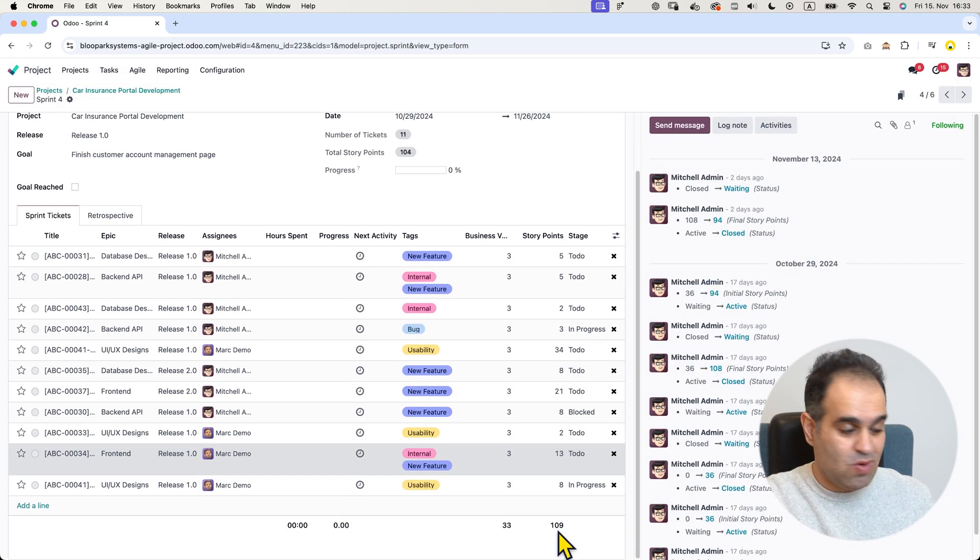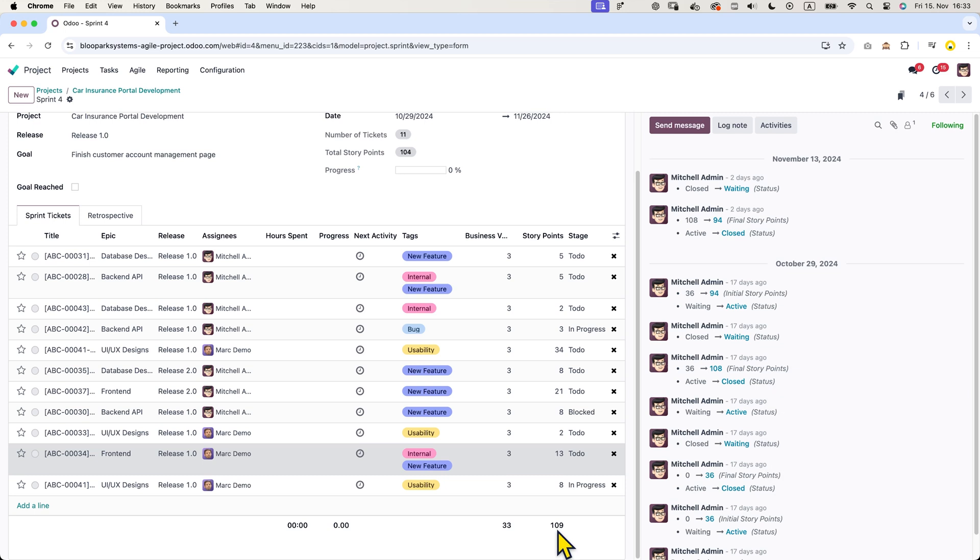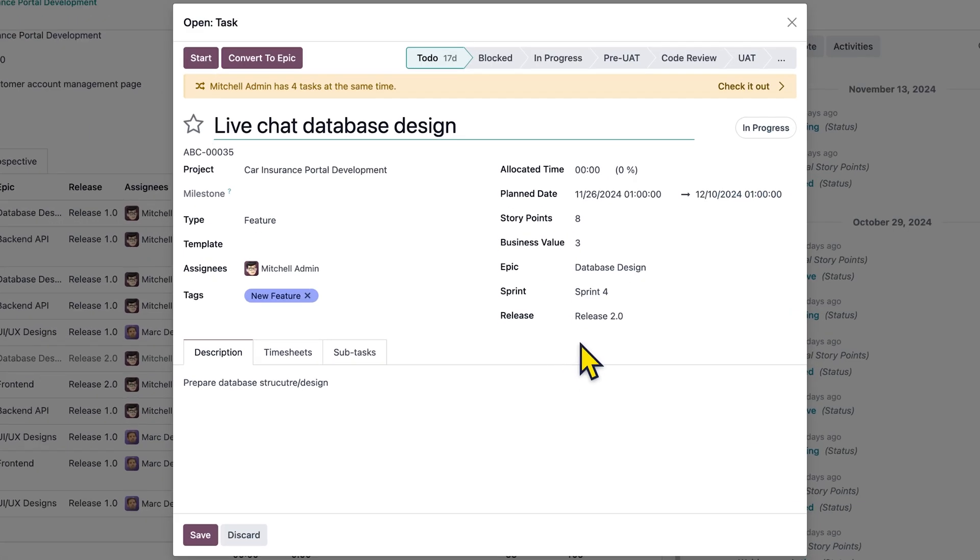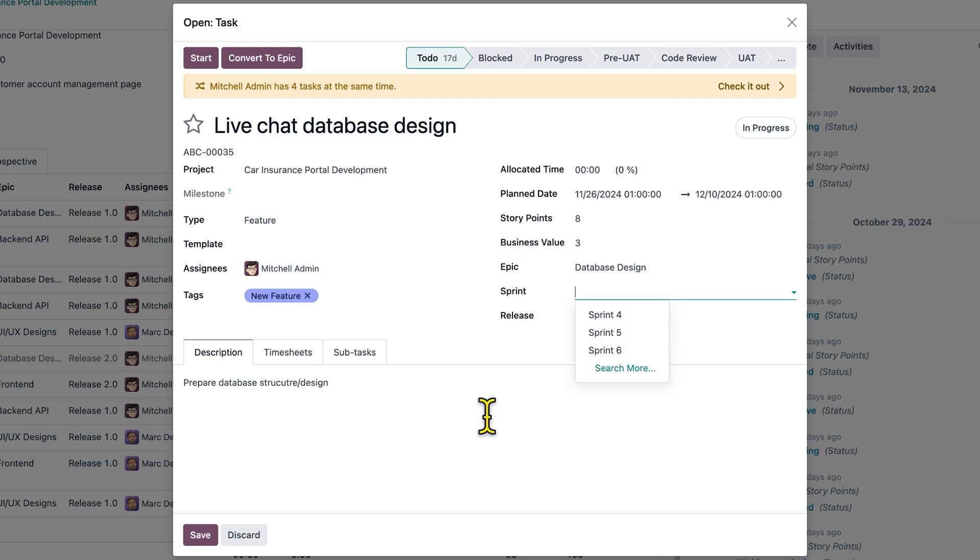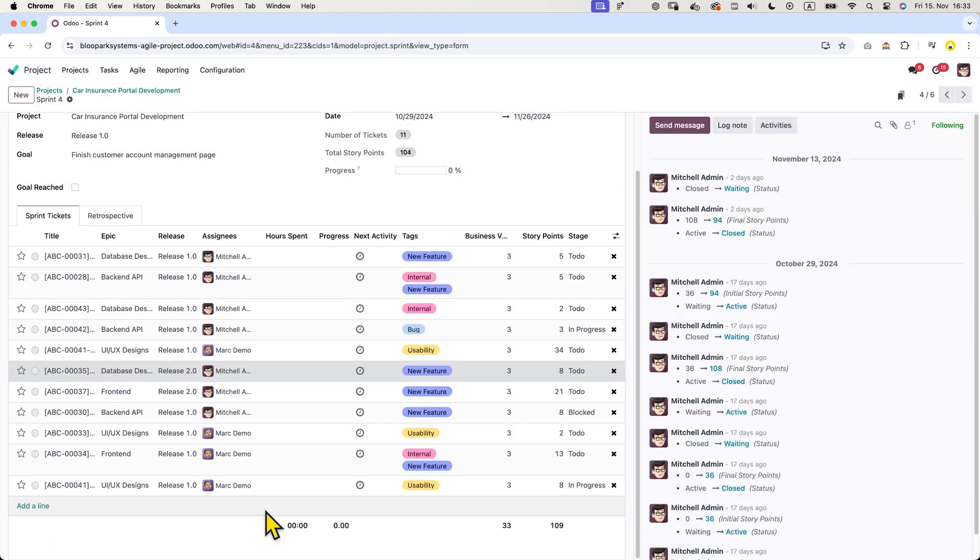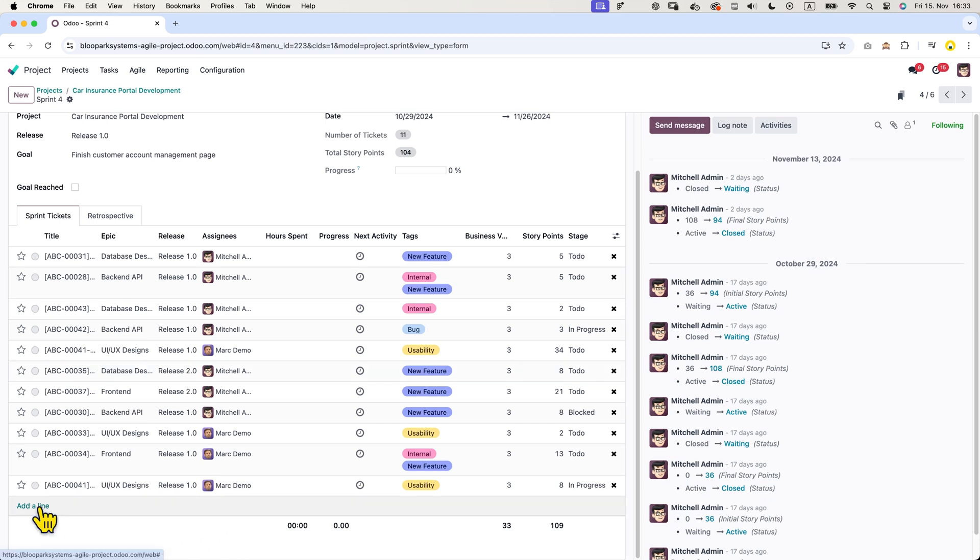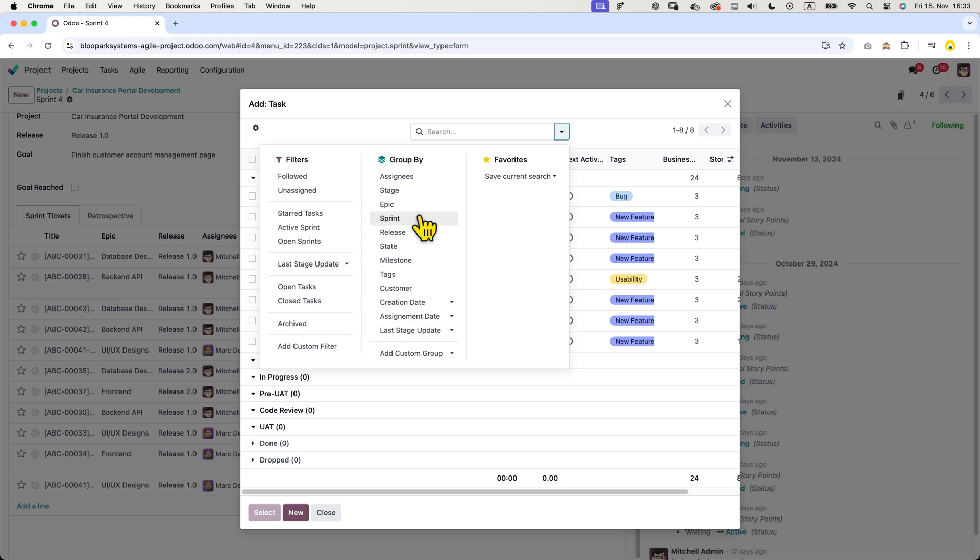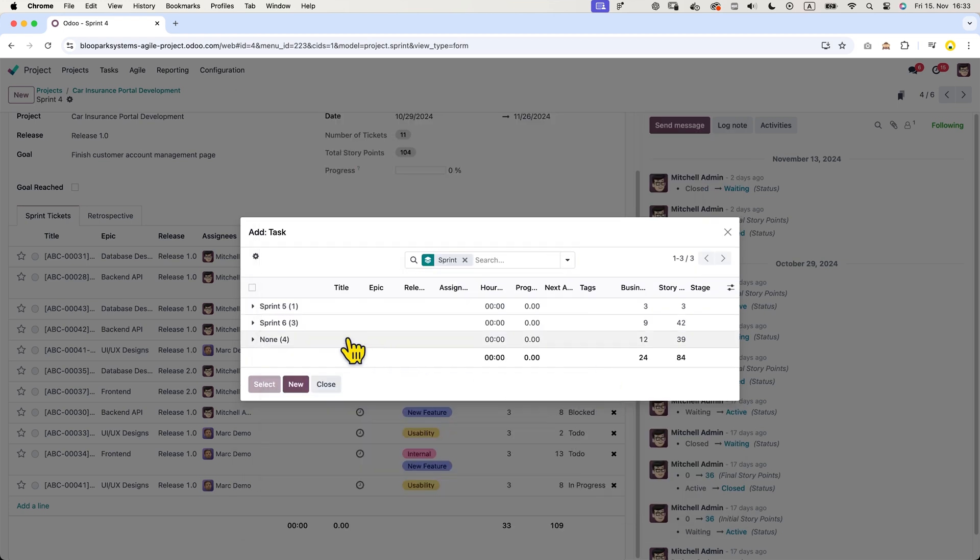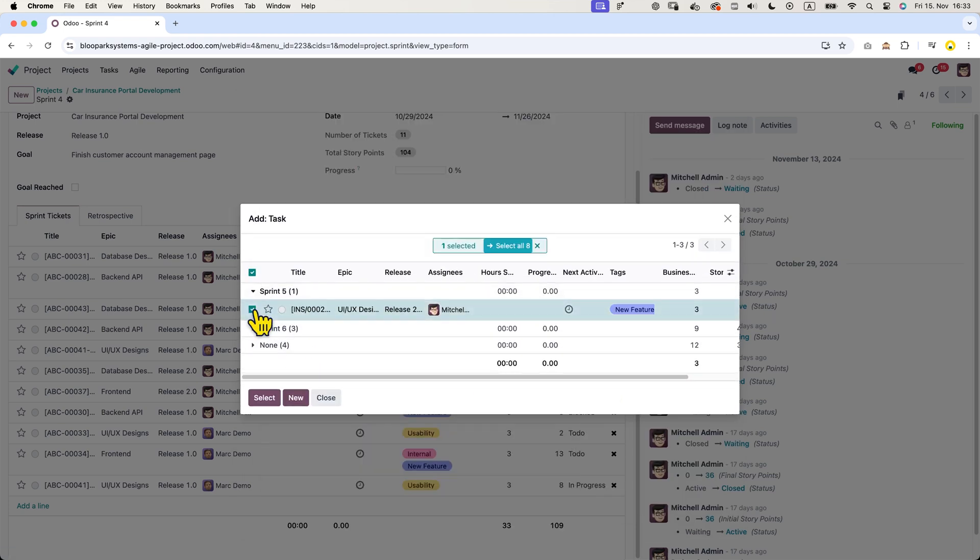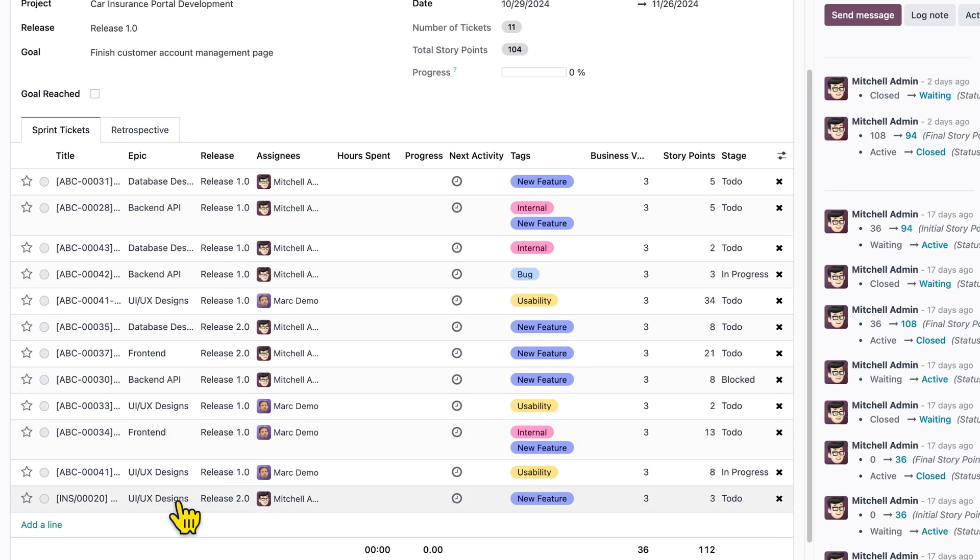Now let's talk about managing tickets. If I want to remove any tickets from the sprint, I can easily unassign the sprint from the ticket and it will move back to the backlog. I can also add tickets from another sprint. For example, I can group by sprint and take a ticket from sprint number five because it's important to add it to sprint number four.